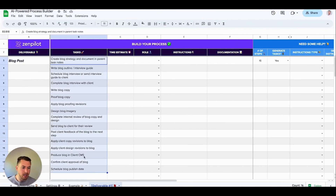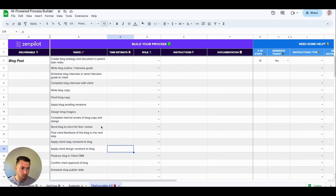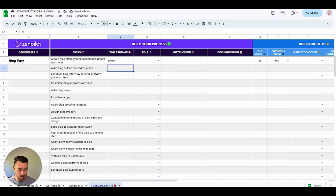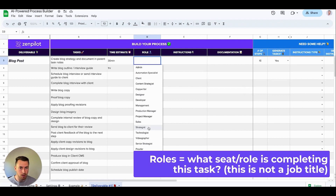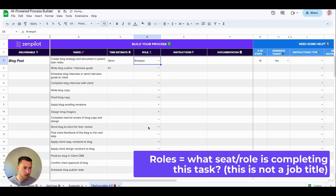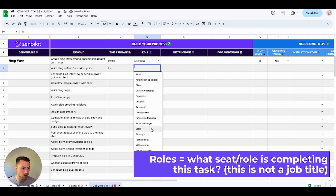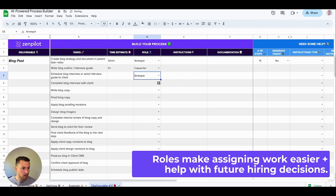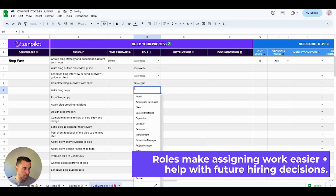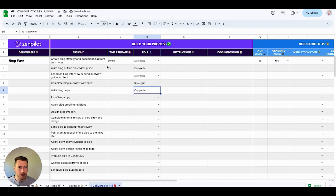Now I have all of my steps. The next step is to go through all these and start adding time estimates as well as the role. This one might only be 30 minutes, this one might be an hour. Then I choose the role — it doesn't need to be a one-to-one relationship with a specific person; it's more about what hat are they wearing when they complete the specific step. So the strategist completes the blog strategy, the copywriter completes the blog outline and interview, and so on. I'll go through and add all the roles as well as the time estimates.